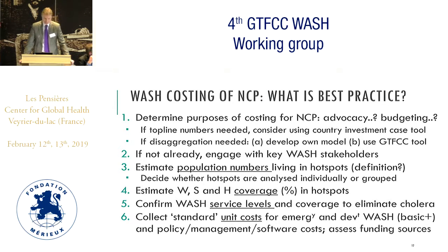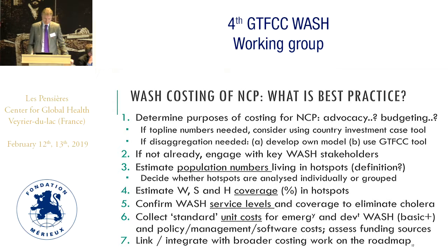And then finally, to collect information on unit costs, whether you have standard benchmarks for government contracts, for contractors, or whether you need to assemble some data yourselves. For sanitation coverage, you'd need to put together all the components of a toilet plus behavior change to get some idea of unit cost. And then not to forget the policy management and software costs, which will probably appear as a lump sum added on to the community level costs. And obviously, the WASH costing needs to be integrated with a broader costing of the roadmap.